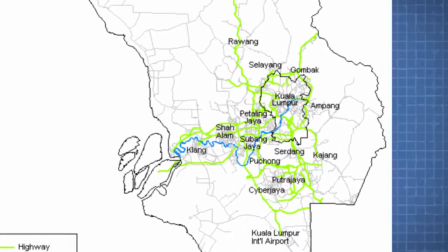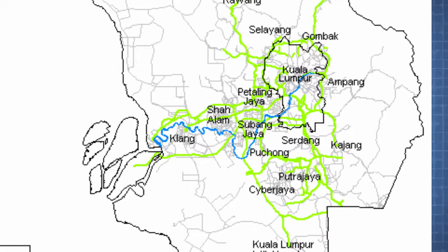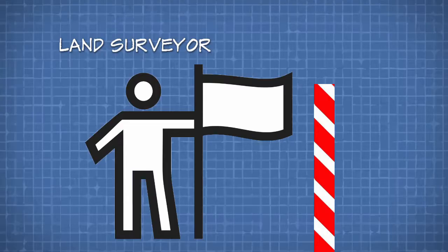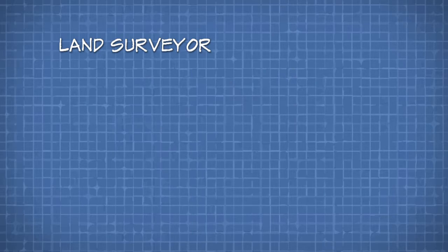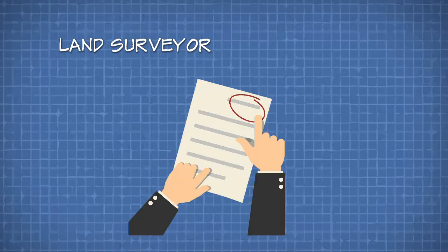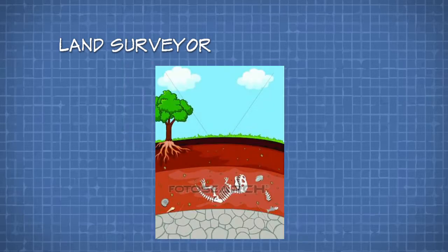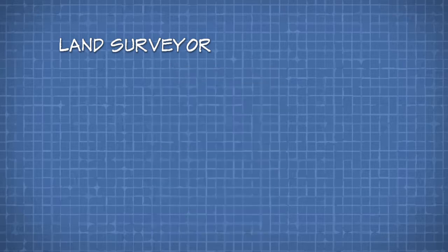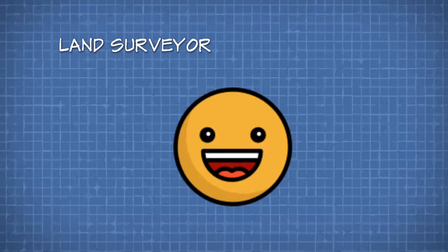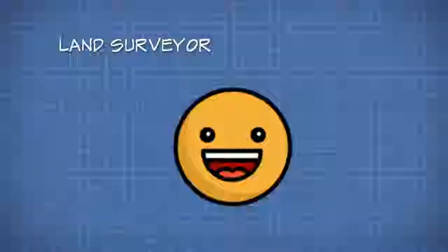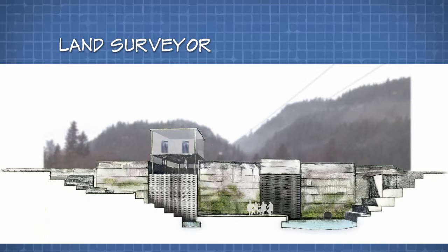What a land surveyor does is look at the boundaries of the property and of the client's land, and set the official boundaries of the client's land, after which they carry out tests of topology and soil, and check for any existing materials underneath or on the site that may belong to the public or the city. This allows the architect to design the building according to the ground topology and all the existing factors already on site, and as such, to draw things accordingly.